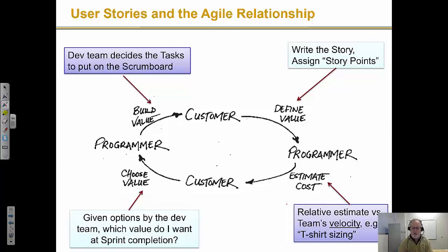So again, in a number of agile shops, I see them just do story points. There's only one estimate. In my mind, the best way of doing this is to have two estimates: the estimate of value, or benefit, and the estimate of work, or cost. And so the prioritization that determines what goes in a sprint is this cost-benefit trade-off. All right, so maybe there are higher value stories that are left in the product backlog if the development team changes its cost based on what you do together.